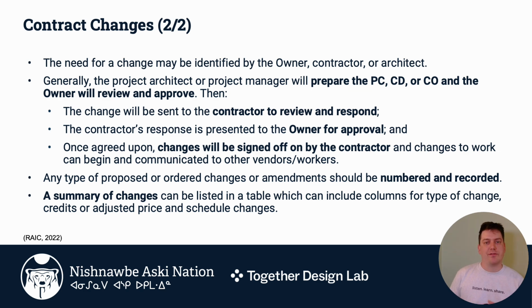What you have in this kind of contract change process is the same back and forth that has been present throughout the tendering and procurement process. And still, this should be done formally and in writing. And why I emphasized on the previous slide who's initiating it is because that's kind of who has the ball first, and they then move the ball to the other person's court, and it goes back and forth through the negotiation, unless of course it's a change directive, until both parties are satisfied with what the impact on the project budget, timeline, and product are going to be before being codified.